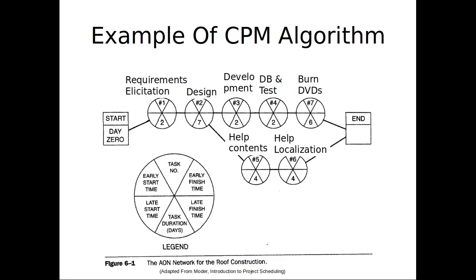That is the critical path. If we mess up in delivery of one, it's going to delay things. This lower path, we have a lot more latitude with it. We can delay things by a day, even by 2, without causing active problems. So the critical path here is marked by 0 float, as we say, 0 slack.